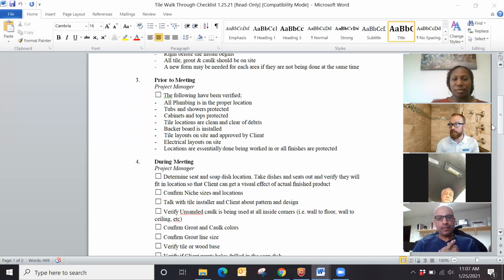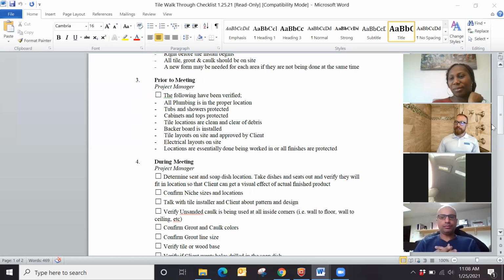So we take the drawings, the CDs should have all the tile elevations to go with it. So we'll look at floor plans, widths, heights, things like that, as well as the elevations to show what we want. Then we'll take tile if necessary, just like the shower behind me. All the decorative glass tiles, what height do they go? There'll be a height on the drawings, but as we all know, that's based on what is built.